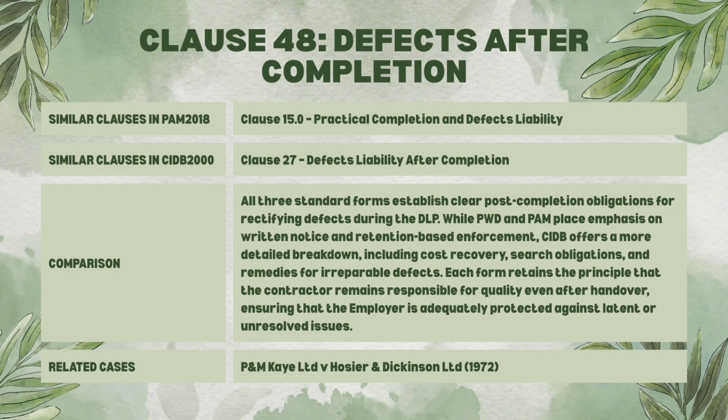The suitable case for this topic is P&M Kaye versus Heuser and Dixon, 1972. The facts are P&M Kaye, the employer, entered into a building contract with Heuser and Dixon, the contractor. After practical completion, several defects appeared in the works. The contract included a defect liability clause that gave the contractor the right to return to the site and remedy the defect within a set period. Instead of allowing the contractor to fix the defects, the employer engaged another contractor to do the work and sued the original contractor for the cost.